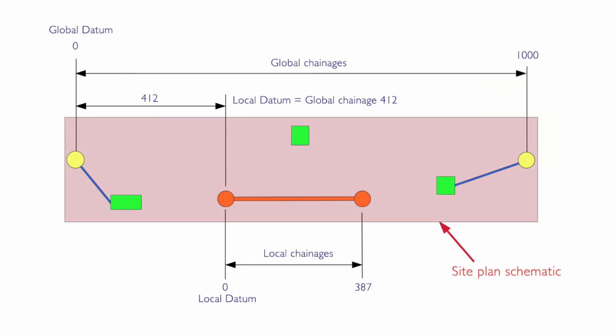Using local chainages in your TimeChainage project can be a time saver, as it can save you having to convert reported progress from whatever datum the production team are using to the global chainages you are using. Instead, you can set your local chainage datums to match what the production team report, and have whatever global datum you wish to have. It can save effort when change occurs, and irrespective of these benefits, it is just plain easier to have a piece of work starting from Chainage 0 rather than something like 564 metres, as would be the case with our tunnel drive A to B.